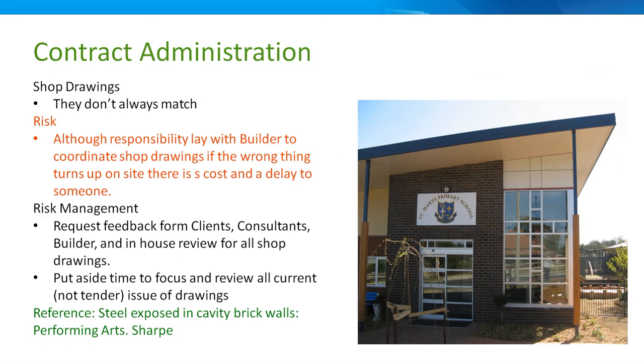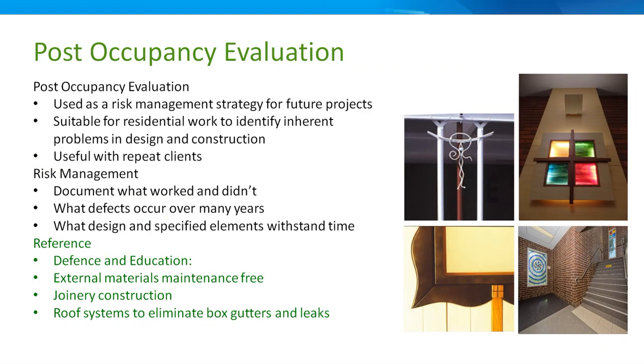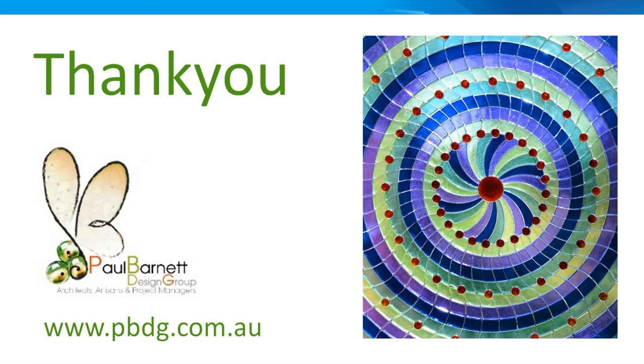There's a lot of things about tendering, and we select tenderers. We do a lot of work before we get tenderers on our list. We've got to know them, they've got a track record, and we review their attitude, their systems, and even then they might take on 2 jobs at the same time as yours and get too busy.